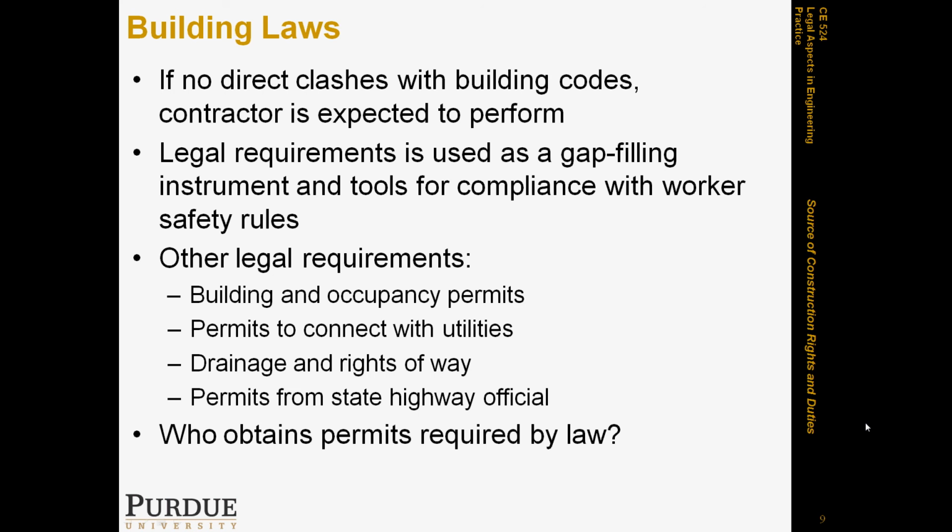On the other hand, while the owner is responsible for the permanent permits, the contractor will be responsible for the temporary ones. For example, if you're closing off a road for doing a heavy lift, the owner really doesn't need to be bothered with that. It's usually a contractor's job to get clearances and permits for their work. But permanent permits would usually be an owner's responsibility.